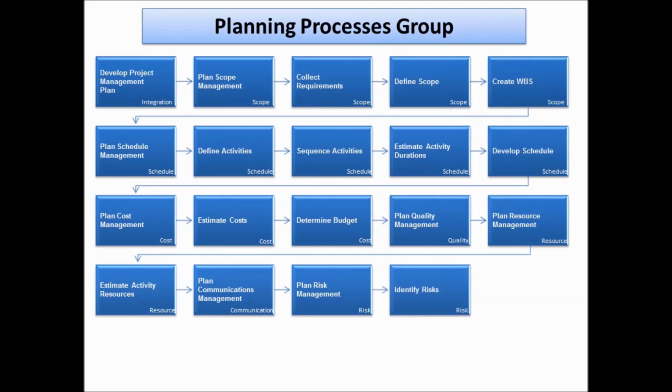Next process is identify risk. Identify those negative risks or threats, or it may be positive risks or opportunities. Let's suppose we may list down some 100 risks in the project. 100 things may happen, both positive and negative. Now, can we consider all of them? No, right? Now, this is where we do two things. We perform something called qualitative risk analysis and quantitative risk analysis. So, talking about qualitative risk, here the main aim is to rank the risks from top to bottom. We rank the risks based on some kind of standards or scale.